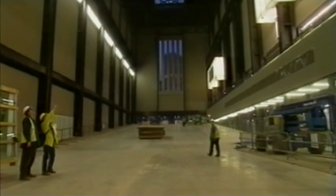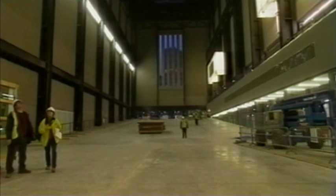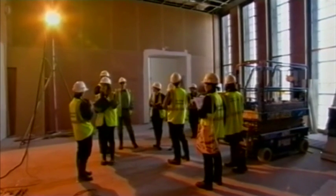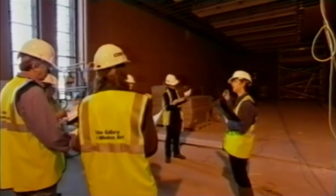Christmas 1999, several months later than planned, the building is finally handed over to the Tate for Frances Morris and her team of curators to get to work on installing the art. Now, I think the best thing about the job at the moment is that the pre-Christmas milestones, to do with finalising content, finally getting there, making those decisions, those arm wrestling matches between curators, all those things that have been bumping along the bottom for months and months have now come home, been resolved, and have been put out. So there are other people's problems now. And the next thing we move into is the process of installing, which is, I think, going to be immense